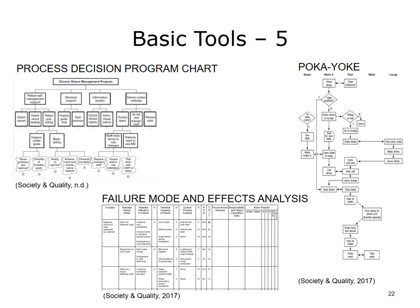The Process Decision Program Chart is a type of contingency plan that guides the efforts of a team when things do not turn out as expected. The actions to be completed are listed, then possible scenarios about problems that could occur are developed. Management decides in advance which measures will be taken to solve those problems should they occur. This chart can be helpful when a procedure is new and little or no experience is available to predict what might go wrong. TOG, 2004.